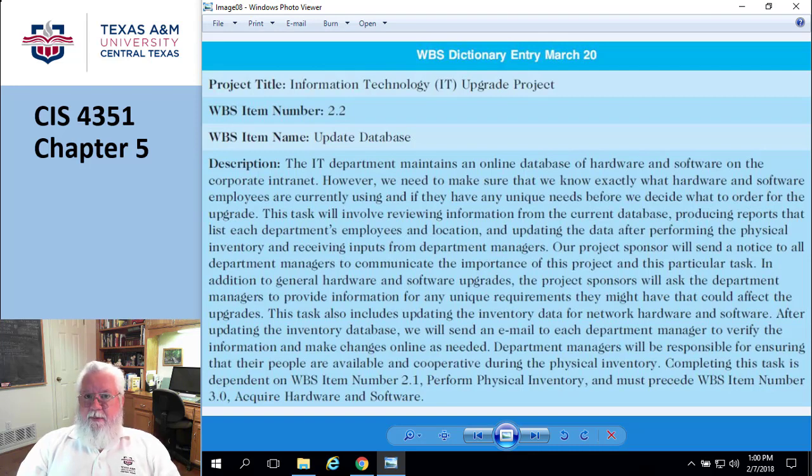Signatures, whatever it requires. And most of the time, if there's no money involved and there's no slip in the schedule, you could probably get away with just, project manager says, yeah, okay, that's cool. And he'll sign it and move on. Otherwise, it may have to go up the corporate ladder. Oh, this will delay us by 6 weeks. Is that acceptable, or do you want us to maintain our original scope? Somebody has to decide.